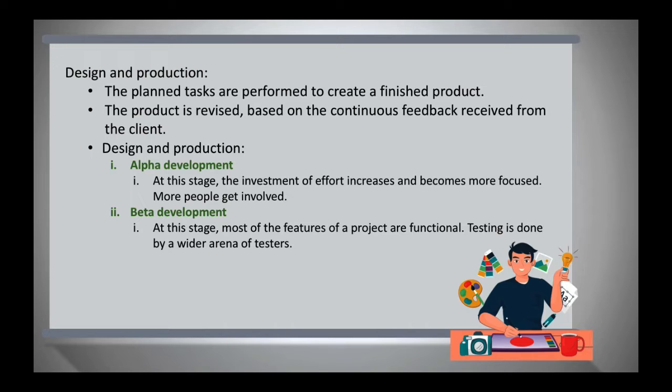However, sometimes the user will request a minor amendment to the product. So, the developer team must make changes to the product according to the user's demand. This situation will occur several times along the designing and producing stage. However, the project leader must play a role in avoiding the project development being just about entertaining ad hoc requests from the user. This depends on the project leader's skills in dealing with the user. This situation will burden the development team if it occurs frequently. And of course it will delay the project.